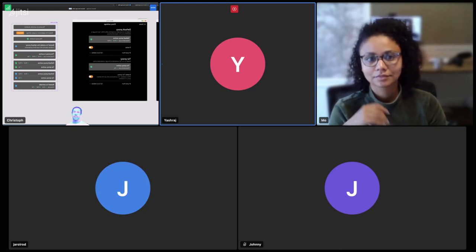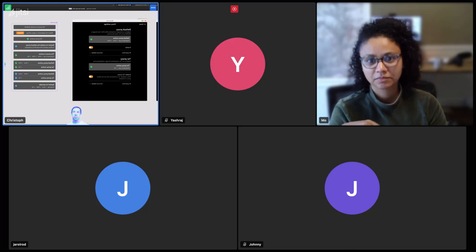We could just begin with a rough estimate. Okay, it takes 2 days to do the design, 2 days to implement it, 2 days of back and forth. That's 6 days. Pump it up to 7, and then see how it goes. As you said, we will figure out how long these things actually take as we go.